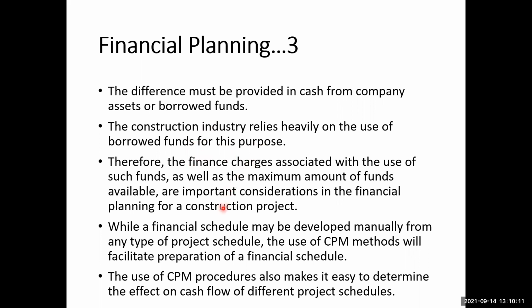Therefore, the finance charges associated with the use of such funds, as well as the maximum amount of funds available, are important considerations in the financial planning of a construction project. When the amount is borrowed by the contractor, the contractor will be paying interest on that amount. So that interest becomes another expense which the contractor must take care of.